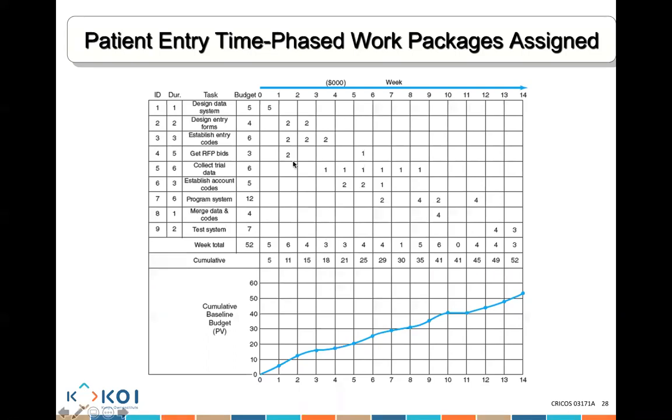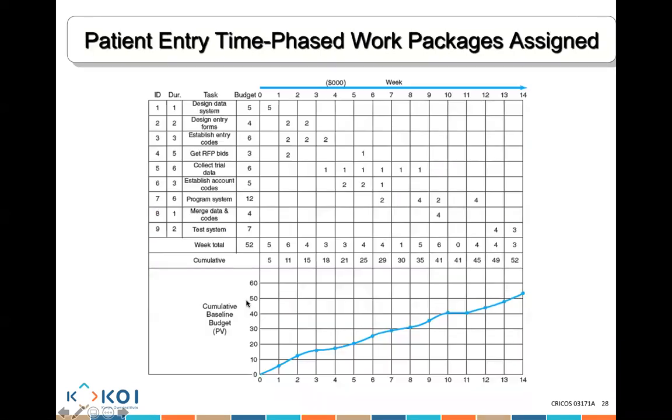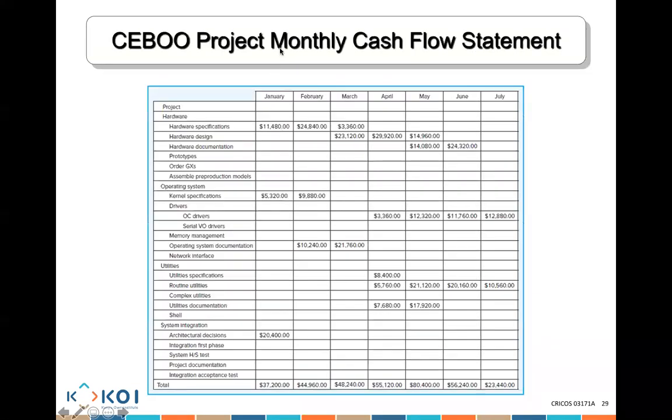work. When you look at the money you need at each period of time, you also need to look at the people I'm going to be needing and the budget I'm going to be needing. The budget, I know for January, that's what I need. For February, that's what I need. Where did we get that from? We got it from all of these activities where I said for every activity, how much money it's going to cost me. And I combine all of these activities and that gives me a budget for each month. How much is the budget? How much am I spending?